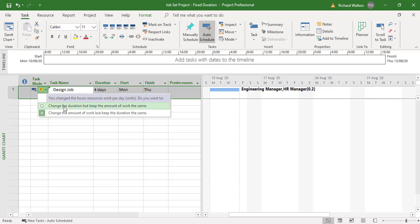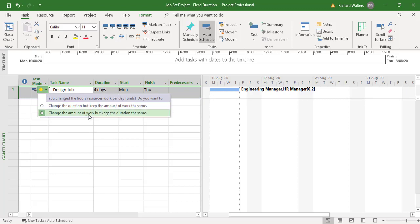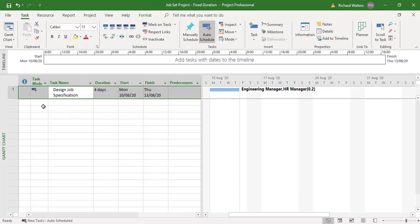We could change the duration and keep the same amount of work, but that would change it to 20 days — we don't want that, we want this to stay at four days. This is a useful option if you're frequently changing resources around and want to make sure the duration doesn't get affected. To maintain the existing choice I'll just click on the default option and the message goes away.